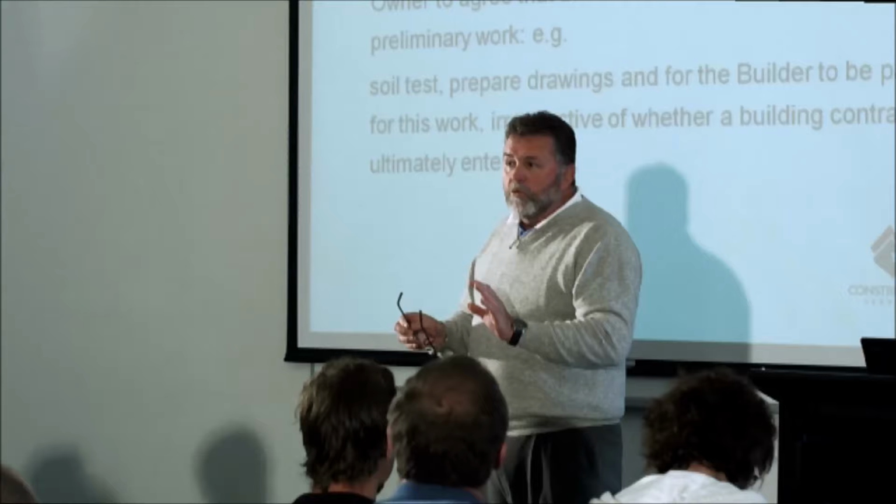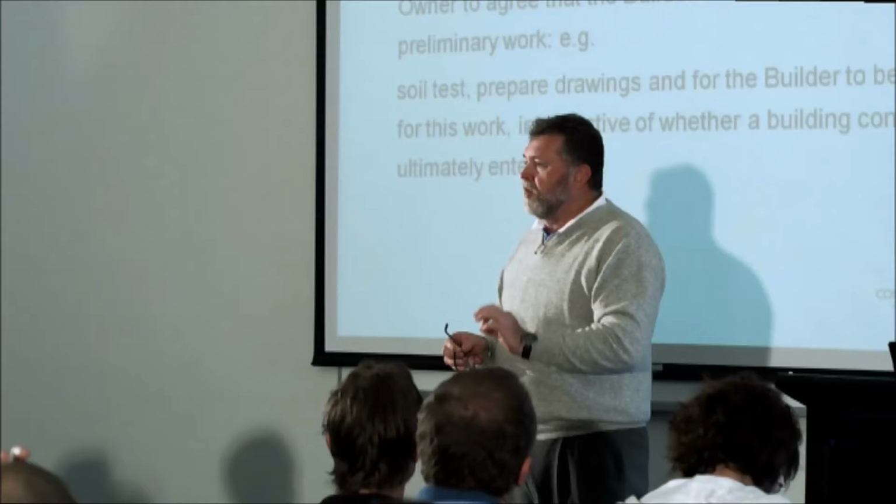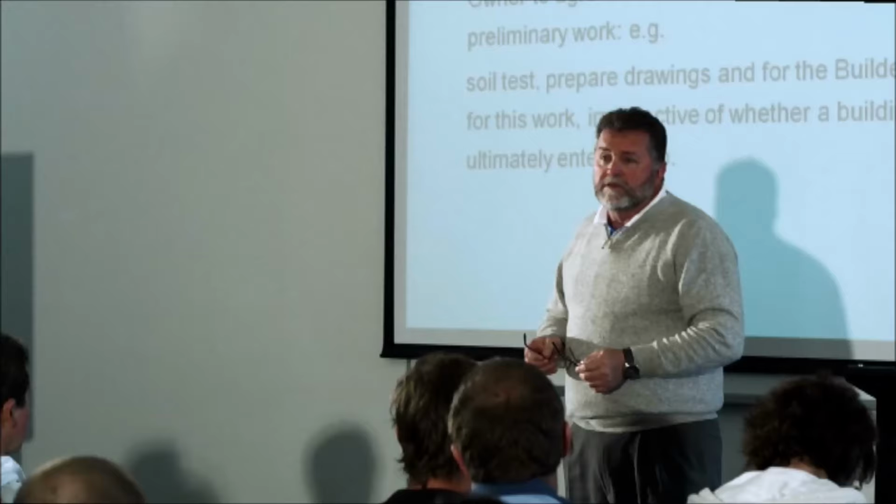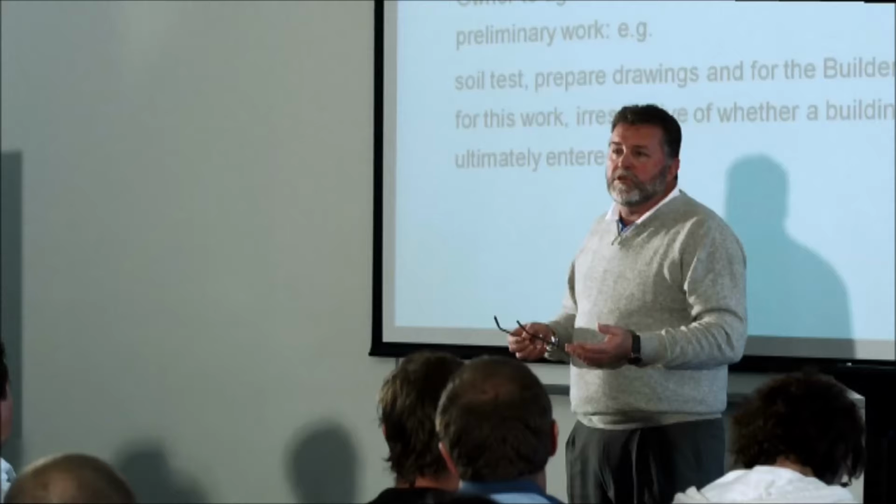One of the things I do stress is that please do a specification. Make sure the owner knows what you are going to give them. So for example, I'm going to give them granite bench tops on their kitchen. Old mate here is actually going to give them just Laminex. So how can we be comparing apples with apples? We aren't. So please make sure you do a specification, or encourage the owners to sit down and do a